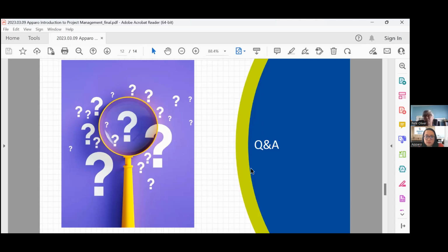What you're going to do is, well, they are sort of the requirements for the project and the goals and the objectives. And then from those, you would go through a process of probably prioritizing them, and then maybe breaking it out and saying, okay, well, if this is going to be a 6-month project, how can I break this up into maybe some smaller pieces that I'm going to deliver incrementally.